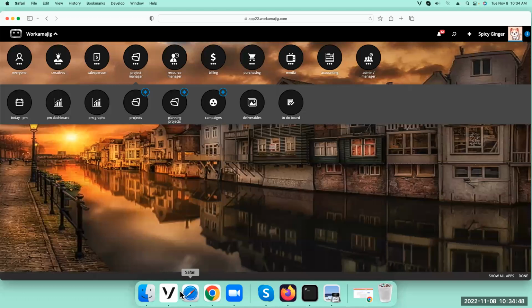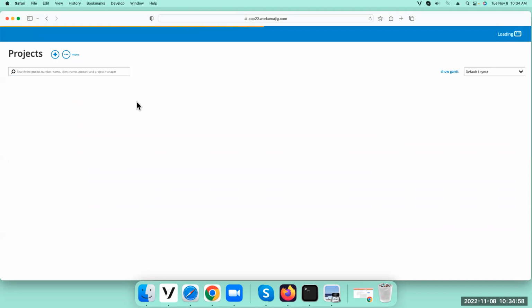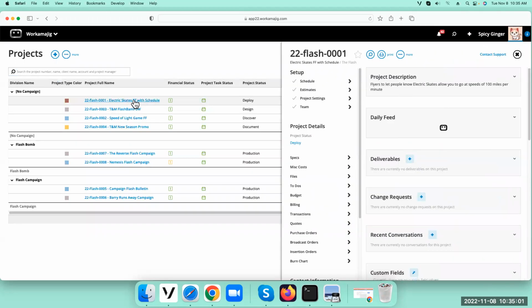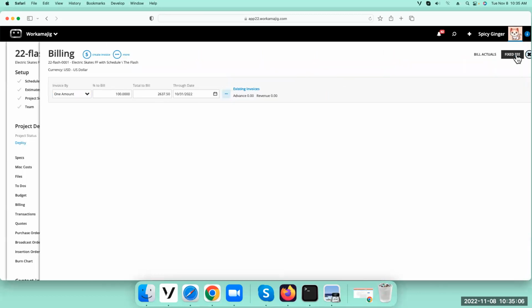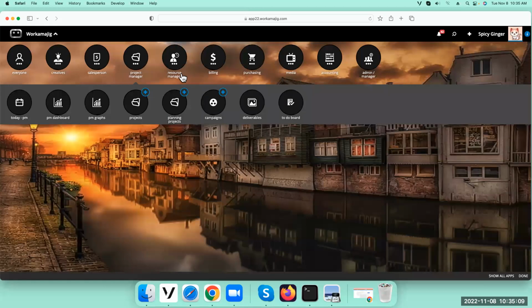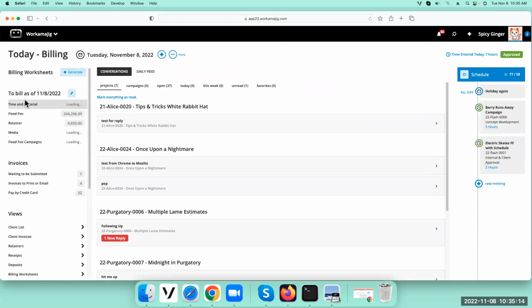Okay, so the first thing to note is, when we talk about billing, a lot of my clients, and if this is you, go directly to their project, current process, go into whatever project it is, go down to billing and bill that project that they need to bill, right? That's easy. Then as you get into Workamajig a little bit more, we have the billing page, right? And a lot of people will come over here and they will bill, here's my fixed fees that need to be billed, here's my retainers, you know, like you'll have stuff to bill over here and you kind of want to do it in mass so it doesn't take you so long. So that's usually step 2.